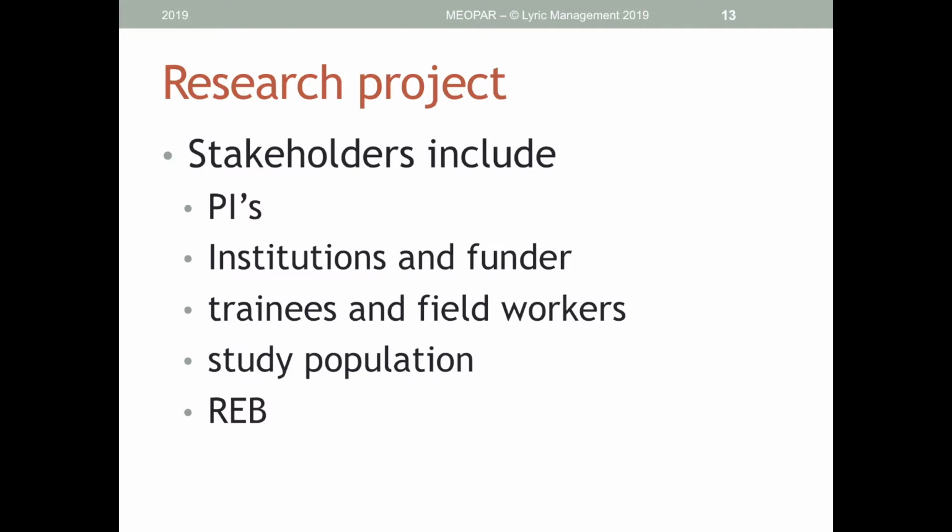And lastly, somebody suggested policymakers who may appreciate the evidence to make informed decisions. Definitely, they would be stakeholders. I probably would put them in the secondary or tertiary category because their involvement or interest would depend largely on what the outcomes of the research would be, which you won't know until the work has actually begun. But they could be part of the group that influences what you do if they have specific questions or things that could be addressed by the conduct of the work. And so maybe including their expectations or desires as desirable or optional requirements would be a way to enhance the value of the study, as long as the original mandatory objectives of the study could still be met.